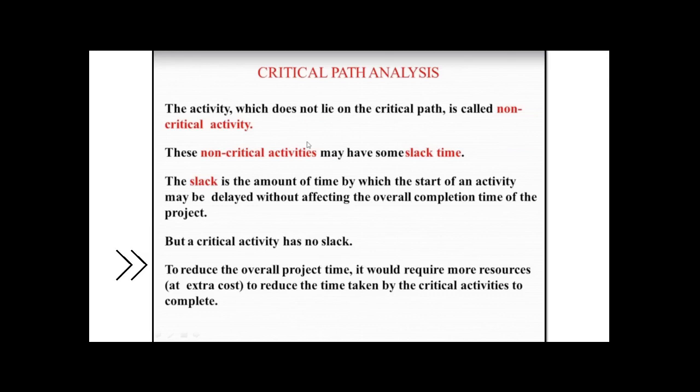Again, to reduce the overall project time, it would require more resources. It means extra cost. Okay, more resources to reduce the time taken by the critical activities to complete. So you have to invest to accelerate the activity.